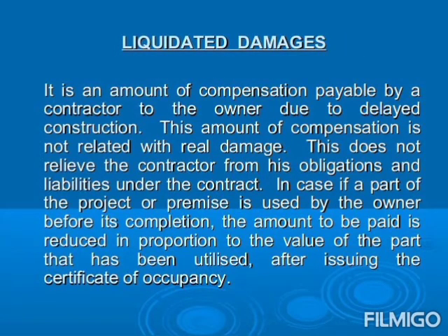Liquidated damages. It is an amount of compensation payable by a contractor to the owner due to delayed construction. This amount of compensation is not related with real damage. This does not relieve the contractor from his obligations and liabilities under the particular contract. In case a part of the project or premise is used by the owner before its completion, the amount to be paid is reduced in proportion to the value of the part that has been utilized after issuing the certificate of occupancy.